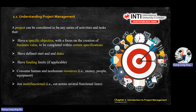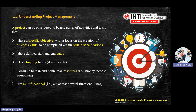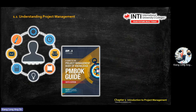For FIP, you have two semesters — FIP 1 and FIP 2. Funding depends on your supervisor or school. Resources are mentioned in your methodology. For your group report, you'll be given objectives and specifications to cover. You need to develop a Gantt chart with start and end dates, include funding combined with resources, and describe how you manage the project within your team — the organizational chart and the roles of each team member.